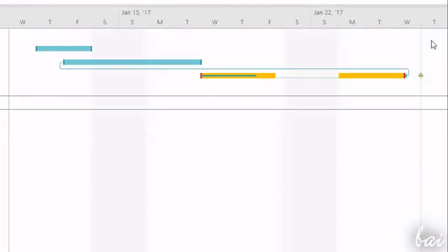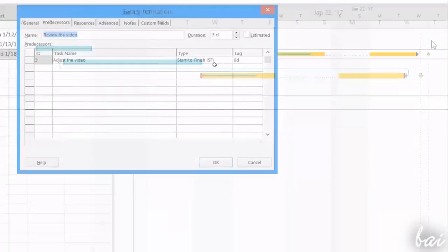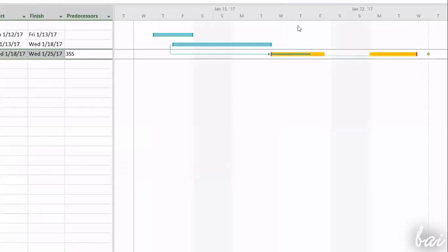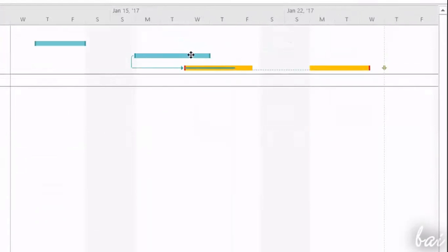Always check the Gantt chart for a quick representation. Consider that the start and finish dates of the tasks may change depending on the link chosen. You can still move and edit tasks as you like, but do respect the time dependence given from the links in order not to get any errors. In case you make any bad or conflicting entries, taskbars may have dashed contours.